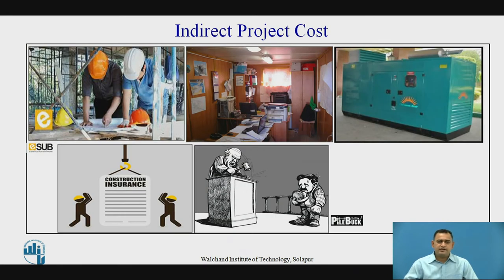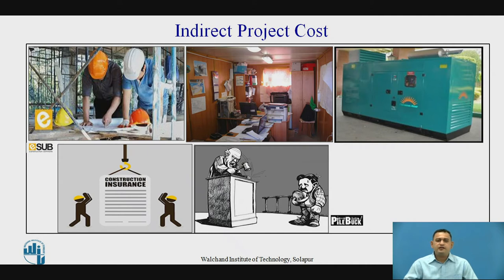Now let's see indirect cost. The indirect costs are nothing else — they are the charge costs associated with the office setup at the site, all the temporary facilities like electricity, telephone bills, stationeries and equipment or machineries required for offices like printing machines, fax, etc. And costs like a project manager, insurance costs of the construction — it may be related to the various resources involved in the project. You may also observe indirect cost due to delay in the project.